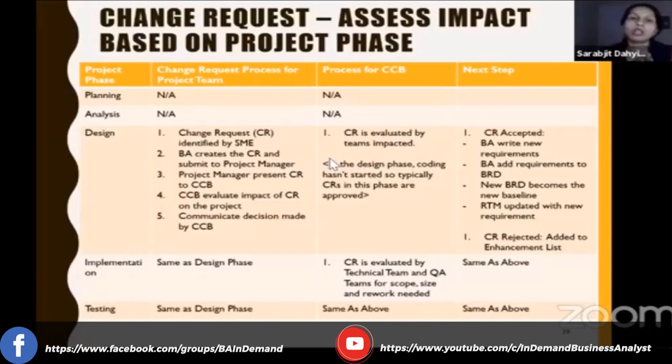When we're in the agile environment and we have changes that come in, they come in either as defects when we're demoing. So let's say we have a 2-week sprint and we are now doing a demo to our product owner and our stakeholders. And they say, okay, this is great, but we want something additional. So that's a change, right? It's a change that we didn't understand or anticipate. So that change could either be a defect or it could be a new requirement that goes back to the product backlog.